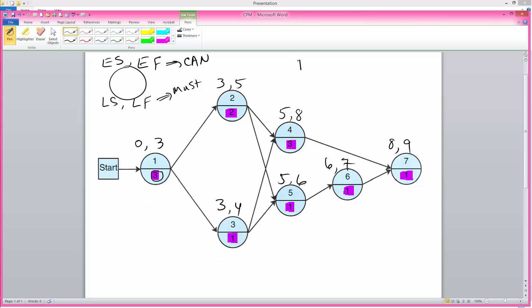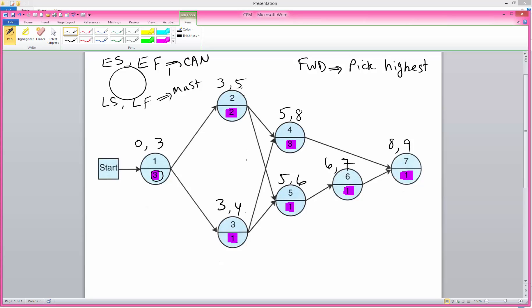Notice that in our forward pass we pick the highest. When you are facing two activities that must be finished before an activity can begin, you pick the highest of the EF, or earliest finish, times.